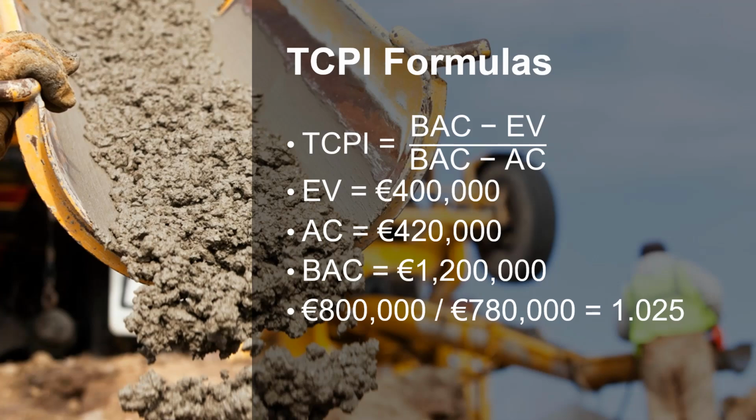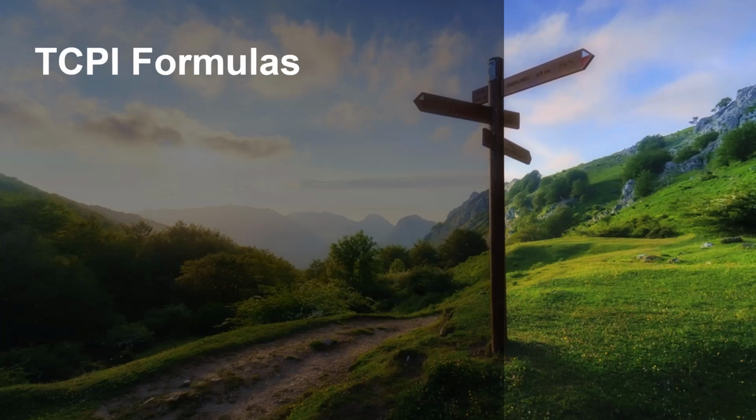Looking at how our project operated up to this point, it seems reasonable that we could set a goal of a CPI of 1.025, which is not much greater than 1. If, however, on the other hand, we learn that the new freeway, the hypothetical freeway we already talked about, that's being built is causing a shortage of concrete, and the delay that we saw in the third house is going to persist for the rest of the houses, we need to make other plans. Assuming that the issues will persist, there are a couple of options that we have for our house building project.